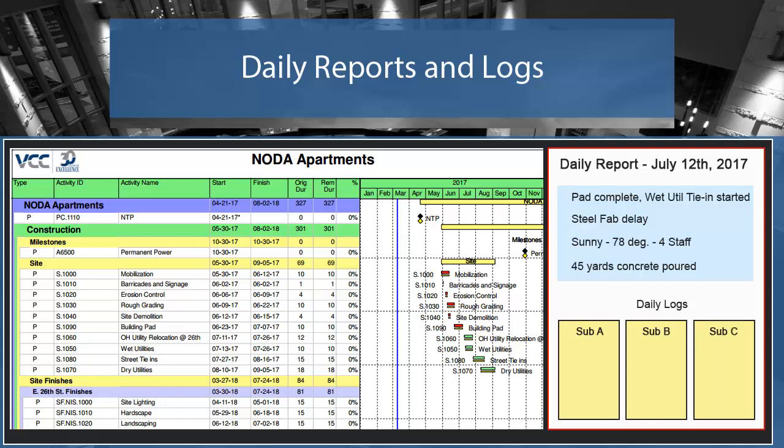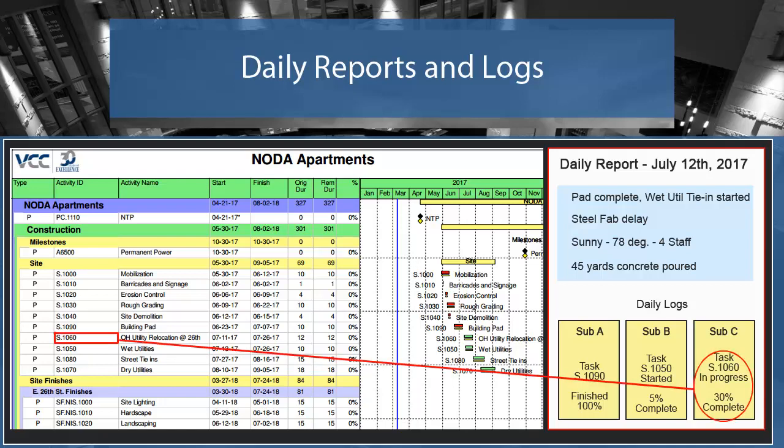A project schedule drives every daily activity, and it is your job to identify whether each activity defined on the schedule is being done according to plan. Project superintendents create daily logs to identify if a specific task has been started, as well as how much progress has been made on tasks already underway. Superintendents also identify when tasks have been completed. Along the way, pictures are taken to give all interested parties a first-hand look at activity progress, and detailed notes are created to explain important aspects of the operation. Let's take a look at how this information is managed in Endeavour.